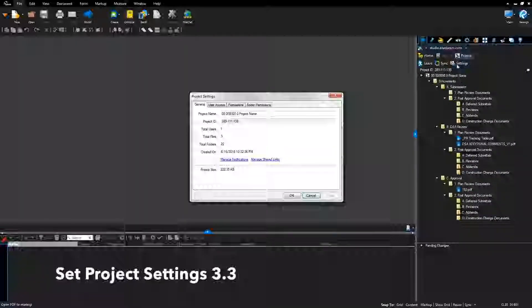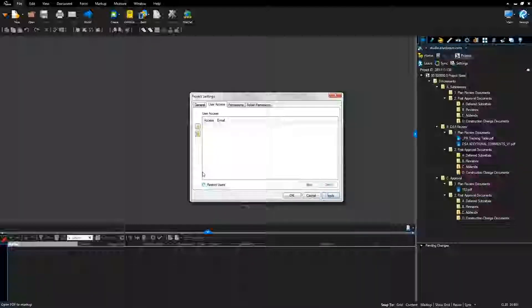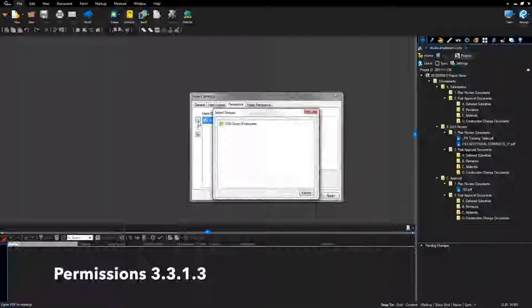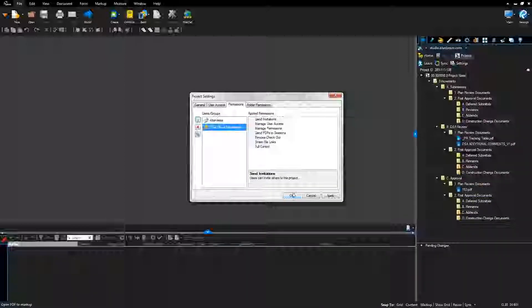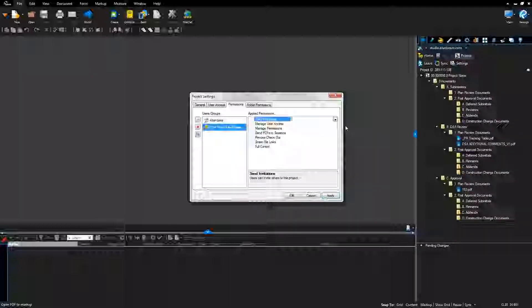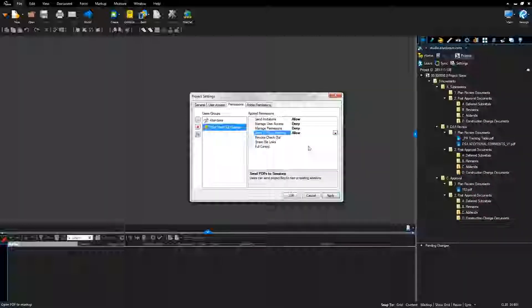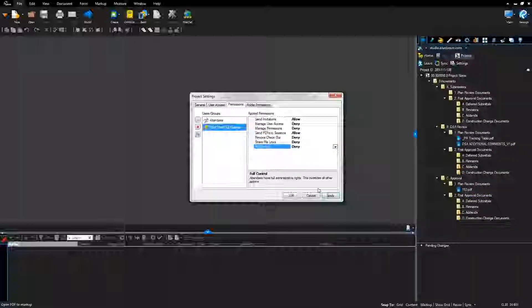In the Bluebeam Studio Project tab, select Settings. Select the User Access tab and uncheck Restrict Users. Click the Permissions tab. Click the green plus icon and add the DSA Direct Employees group. Update the permissions for attendees: change send invitations to allow, confirm all others are denied. Select the DSA Direct Employees group and update permissions: send invitations is allowed, manage user access is denied, manage permissions is denied, send PDFs to sessions is allowed, revoke checkout is denied, share filings is denied, full control is denied. Click Apply.